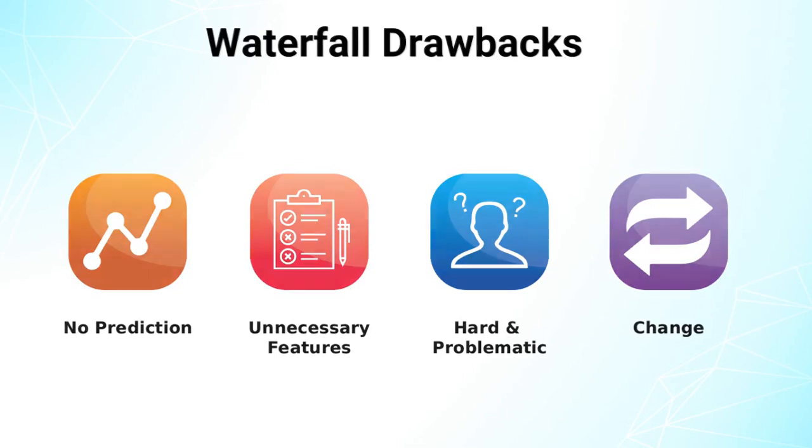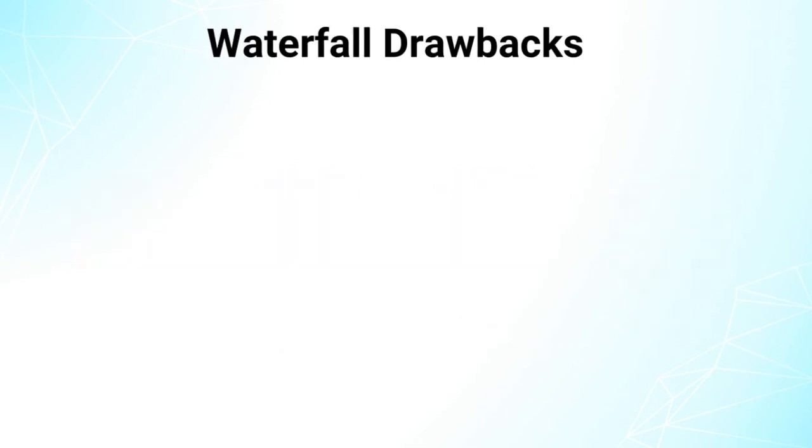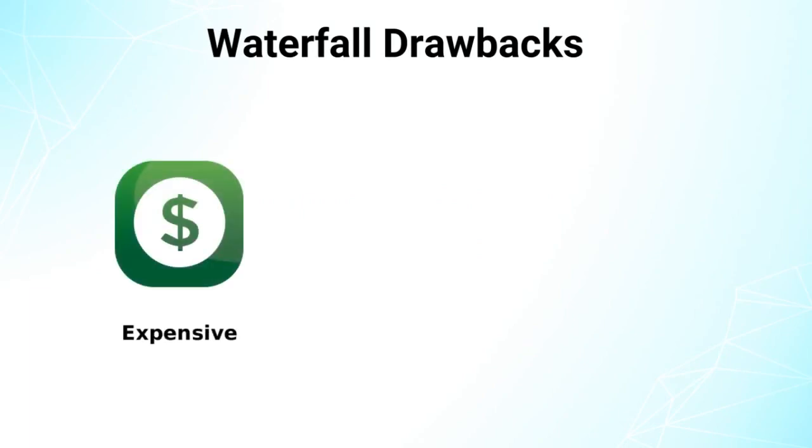In Waterfall approach, change is hard and expensive. This is because you've created a big upfront plan and any changes can have major ripple effects for the rest of the project. A change later in the project life is especially difficult and expensive to make because a lot of work has already been put into the original design, and the product isn't designed to handle changes like that. This is why in any Waterfall project there is often a separate change management process for dealing with changes to the original plan.